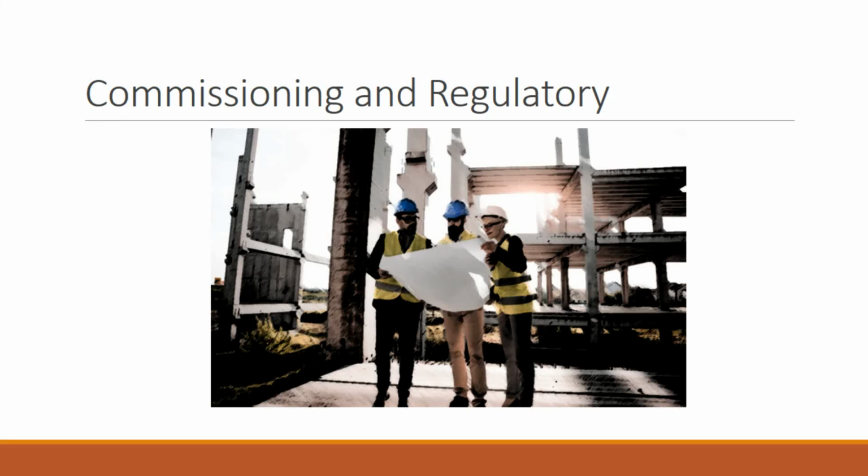over to the users. Regulated industries, such as the utility industry, may require an additional step before being put into final use or selling or actually energizing the equipment. And this process is referred to as validation or qualification. Establishing written evidence that offers a high level of assurance that a particular procedure will consistently result in a product that meets its planned standards and quality attributes is what is meant by validation. And you will often see big commissioning procedures being done with major equipment such as breakers and power transformers.